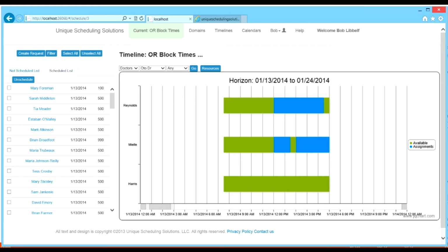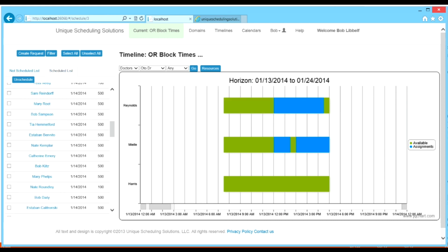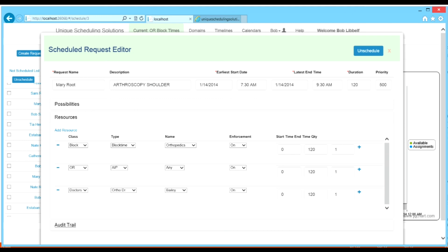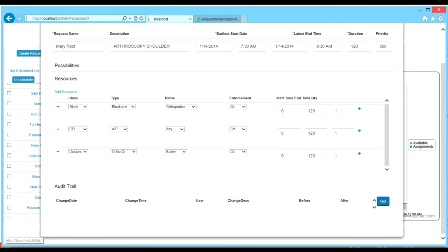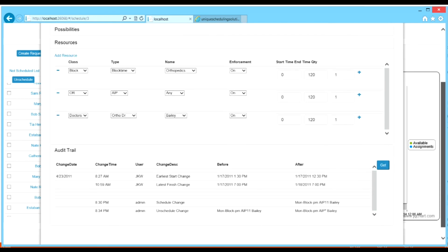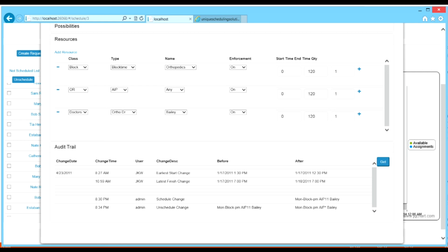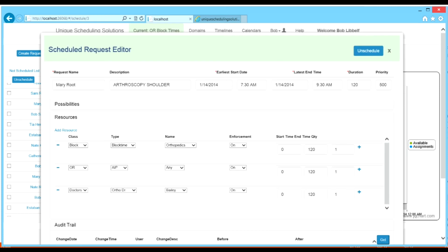Now, a final comment. Schedules almost always change, and a history of their revisions is helpful. For example, perhaps you need to keep track of the as-planned versus the as-performed schedule. To assist in this bookkeeping, the system has a built-in change log that keeps track of all the changes made, when they were made, and by which user they were made. Many users update their plans to correspond to actual activities for historical reasons or for assuring that their billing is correct.